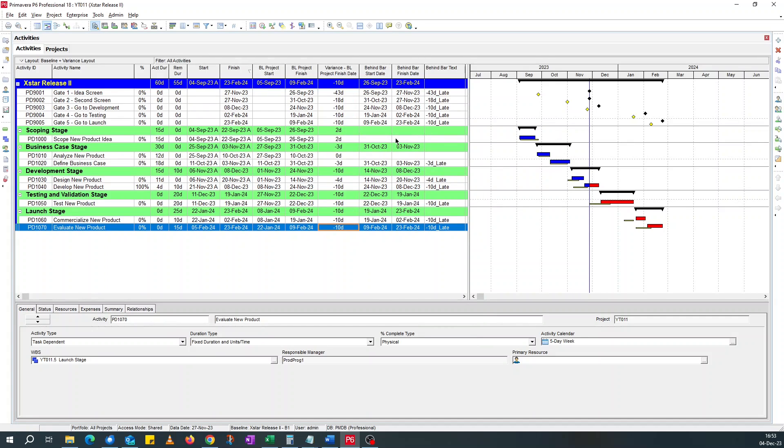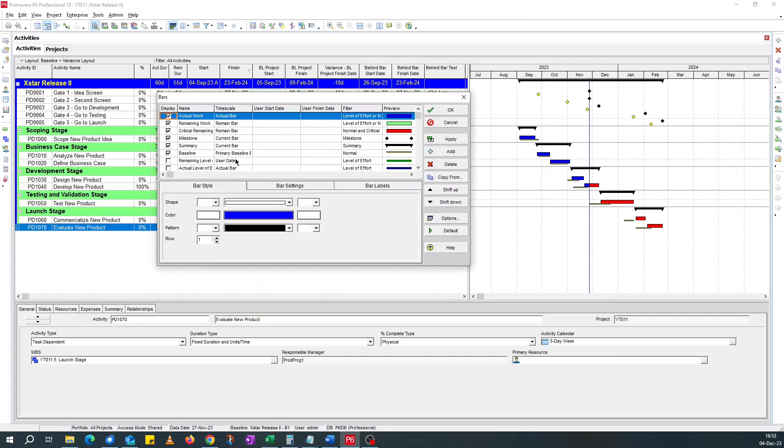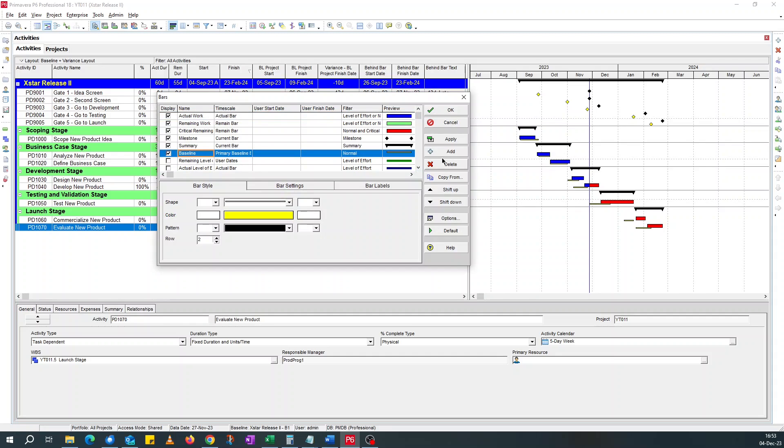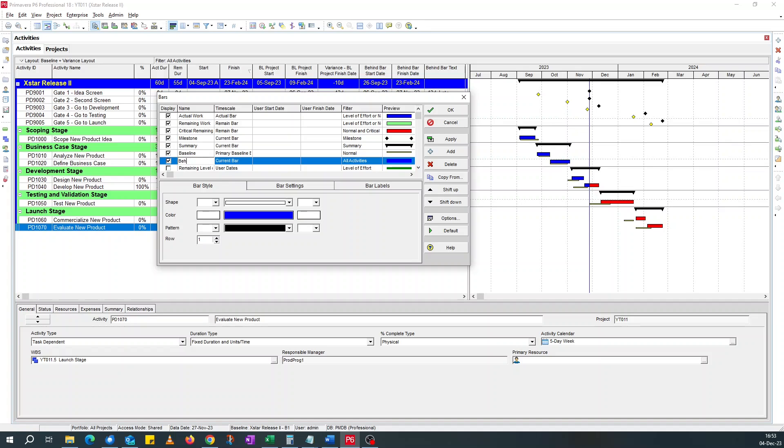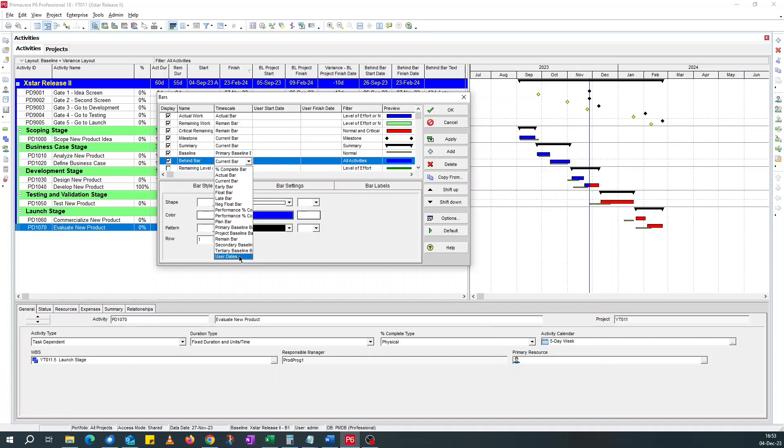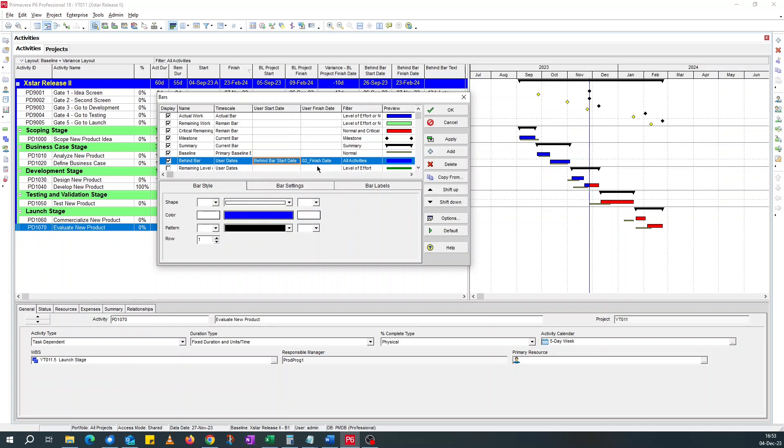So we need to format the bar so that this information appears here. If I go to the bar, behind bar, add a new row. I can call it behind bar. It sounds criminal. That's OK. Behind bar. And I'm going to change the time scale should be user date. And for these dates, I'm going to choose my behind bar start date and my behind bar finish date.